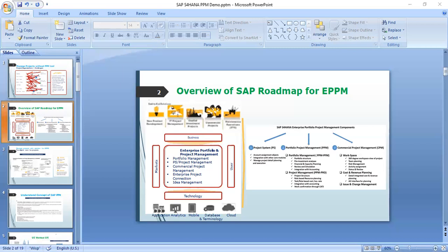Cost centers, these things you're going to define: plant, business area, functional area, everything will be defined under that. Under the same controlling area, there may be different companies. We're going to work on the different companies under the same projects. All the costings will be different, budgetings will be different, their plannings will be different. You're going to post all your actuals over there, and you're going to combine all these into one project.